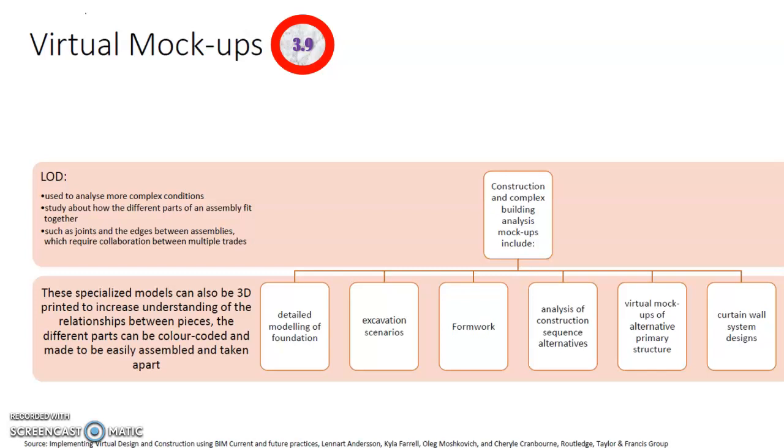We will talk about levels of development in the later stages of this lecture, but having a virtual mockup will allow us to analyze more complex conditions and study how the different parts of the assembly fit together, such as the joints and the edges between the assemblies, which will require collaboration between the multiple trades.